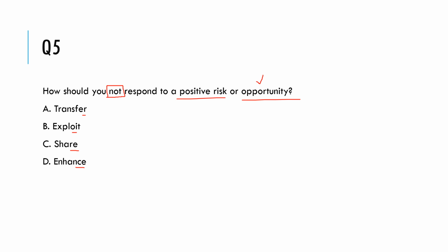You will actually do three of these, but not the fourth, because this is not something that you would respond to when an opportunity knocks the door. And the answer is transfer. Why would you transfer your opportunity to someone else?